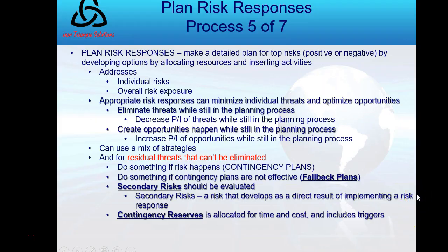Okay, working our way through risk management. First, we planned risk management, resulting in a risk management plan. Then we identified all the risks, their sources, their categories, identified a potential owner of the risk, and then identified a potential response. Then we did qualitative risk analysis, which provided a subjective probability of impact to prioritize the risks, some of which end up on a watch list. And we finalized the risk owners.